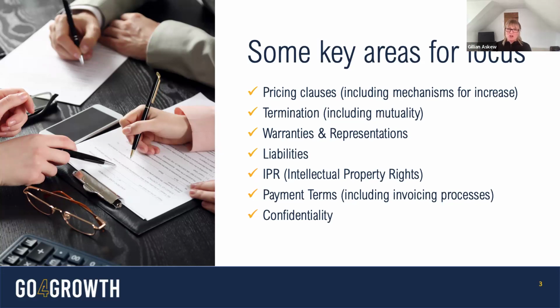So, for example, some contracts might look for a contract duration price, a price that is fixed for the term of the contract. And there may be mechanisms in addition to that where you have the ability to levy increases linked to things like inflation. Or it might be annualized pricing, or there might be volume breaks on pricing. So there are different ways that pricing clauses are invoked in contracts, but it's really important for us to have a read through those things and think about actually what will the pricing look like for the duration of the contract. And not just the initial term, but including any extensions.